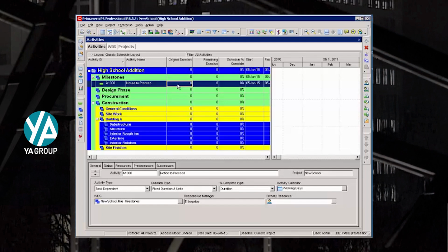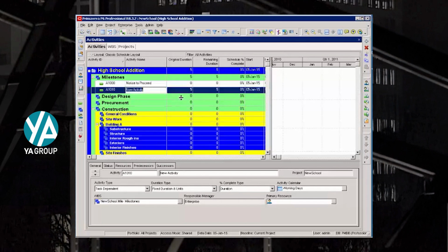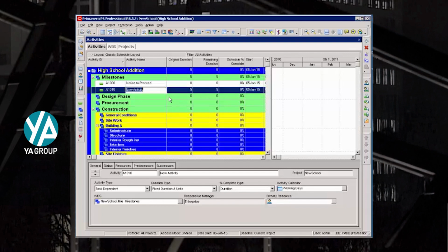Now to add the next activity, I can either hit the plus sign or I can select Insert and type Substantial Completion. The activity IDs are being numbered by default, which I set on my Projects tab. When I have this project selected under the Defaults tab, you'll have an option in there to set the auto numbering for your activity IDs.